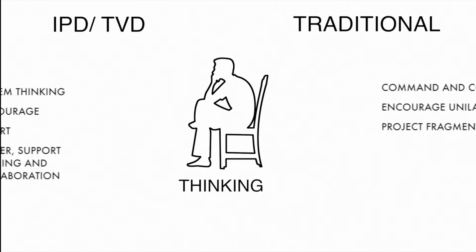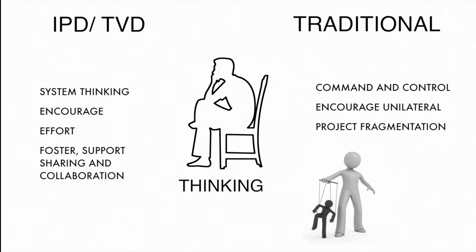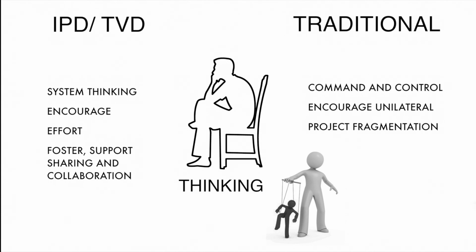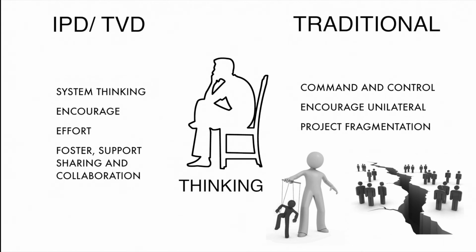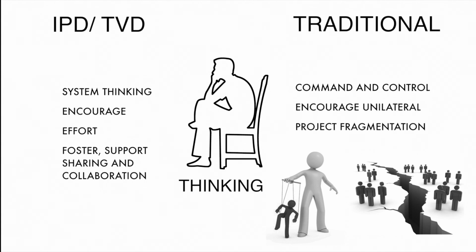The traditional approach uses legislative contracts as a framework to coordinate projects, although this is extremely restrictive and only promotes disputes rather than collaborative problem solving. Latham 94 suggests that there is a great concern with the lack of integration of different areas of expertise needed to specify, design and construct. Project fragmentation occurs as there is little incentive for project teams to learn together. This is mainly as it is highly unlikely they will work together again.